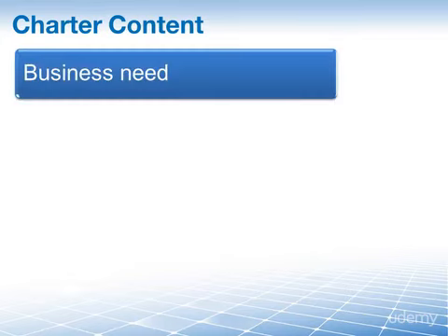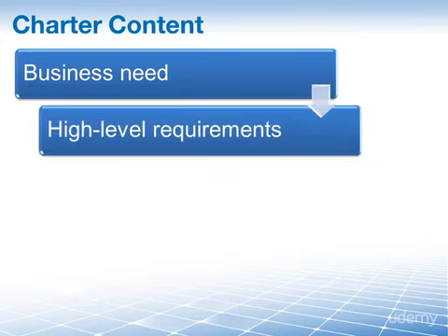To me personally, the most important one is the business need. After all, we do our projects to support a company's business, so this one here is at the top of my personal list. The business need is closely followed by the requirements. This early on in the project, the requirements can of course only be at a high level. Description of what will satisfy the needs of customers, sponsors, and other stakeholders.